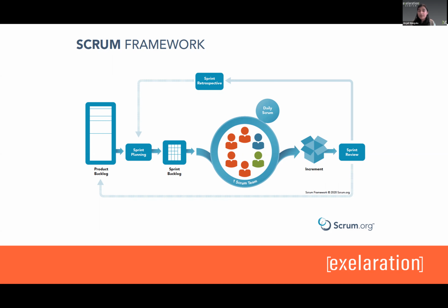And then what comes out of those retrospectives, oftentimes you will come out with some action items that you want to work with. For example, hey, you developed something, but it ended up breaking my thing. An action item that could come out of that is, let's write some automated tests. That way, if one developer goes in and breaks something unintentionally, the tests will tell us. So that is an action item that has come out of one of my retrospectives before. So there are definitely multiple beneficial reasons to having that sprint retrospective in all of these different meetings throughout.